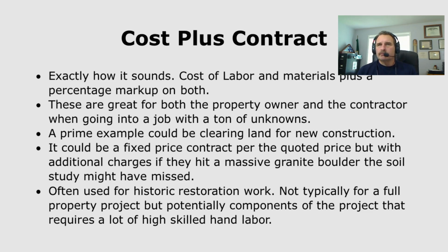You could have a fixed price contract per the quote, but additional charges may come in if, let's say, engineers have missed some massive boulder or something, and now you've got a dump truck sized rock sitting under where your house is supposed to be. I mean, stuff like that. That's exactly like things hidden in the wall.